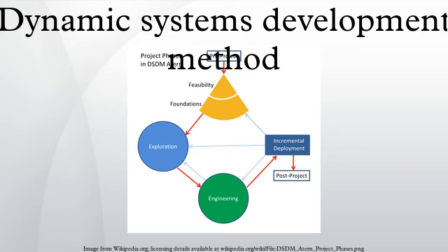Process data model. The identify functional prototype activity is to identify the functionalities that would be in the prototype of the current iteration. Recall that both analysis and coding are done. Prototypes are built, and the experiences gained from them are used in improving the analysis models. The built prototypes are not to be entirely discarded, but gradually steered towards such quality that they can be included in the final system. Agree schedule is to determine when and how the prototyping will be implemented. It extends the scope to the available timetable and prototyping plan.